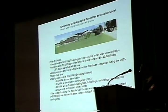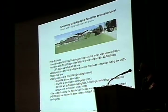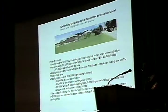The superintendent's estimate of relocation is a range right now, as the plan is being looked at. I believe it is approximately $300,000 to about $500,000 in total estimated cost. So the difference between what relocation ends up actually costing, $300,000 to $500,000, less the $100,000 that's already baked into the hard numbers here, that difference could be as little as $200,000 and as much as $400,000 will come out of the $1.2 million of construction contingency.